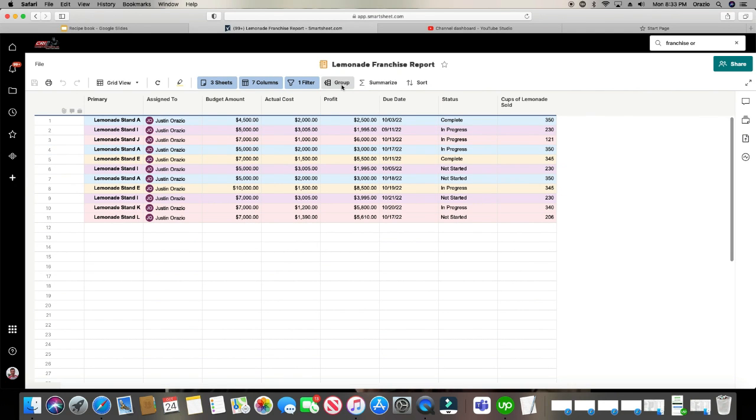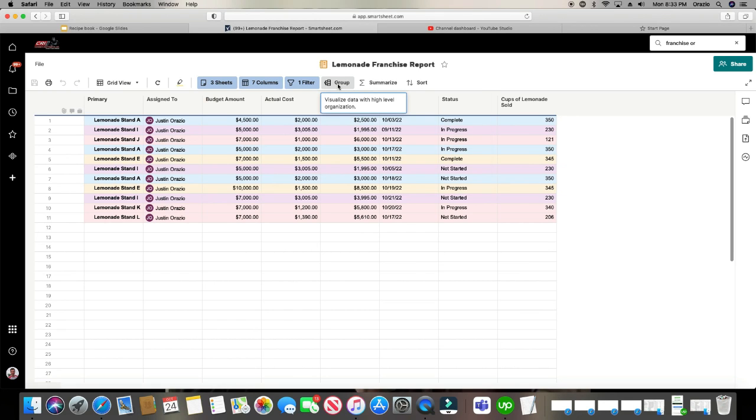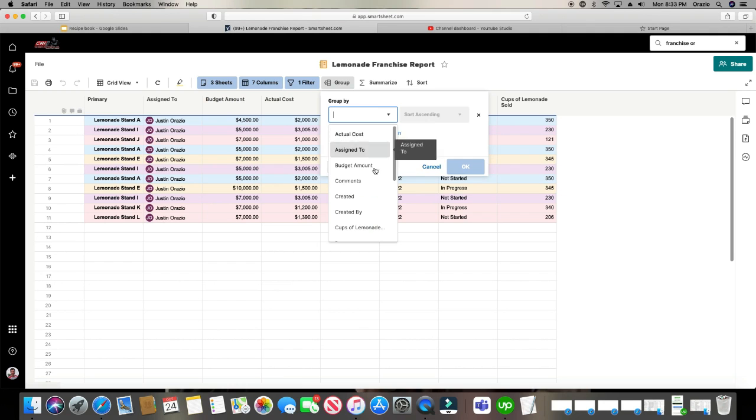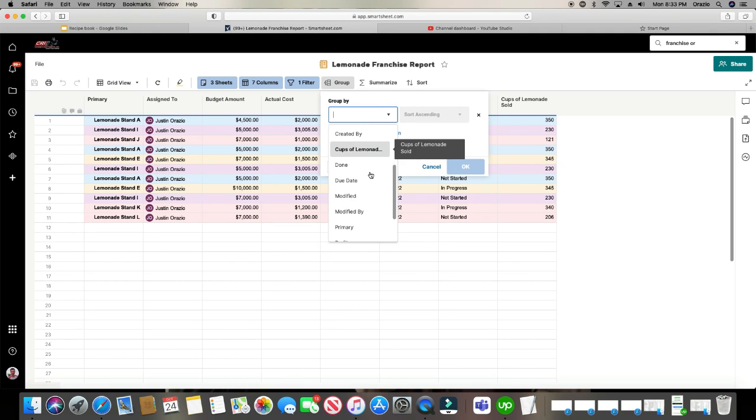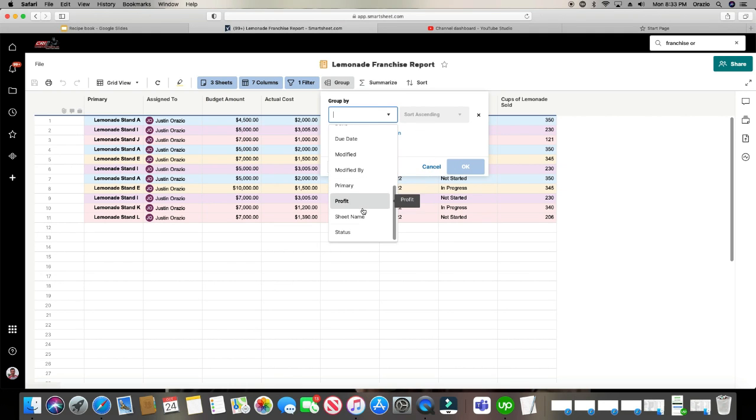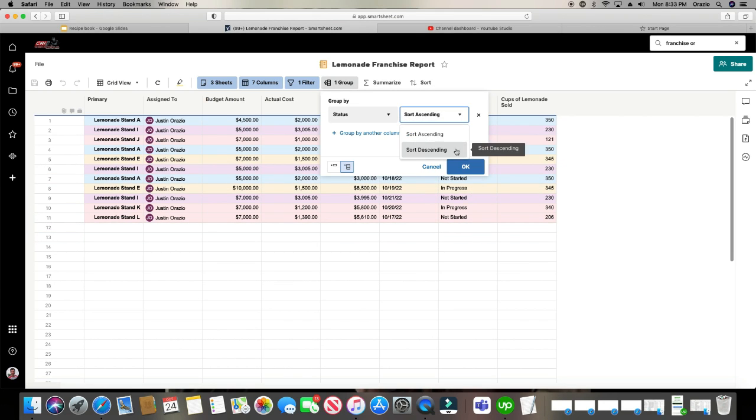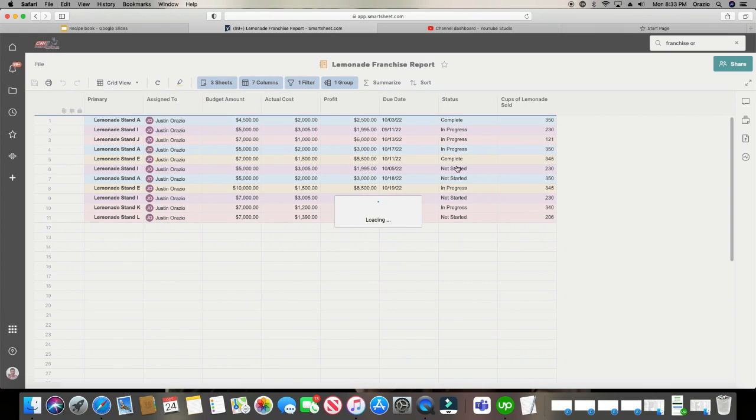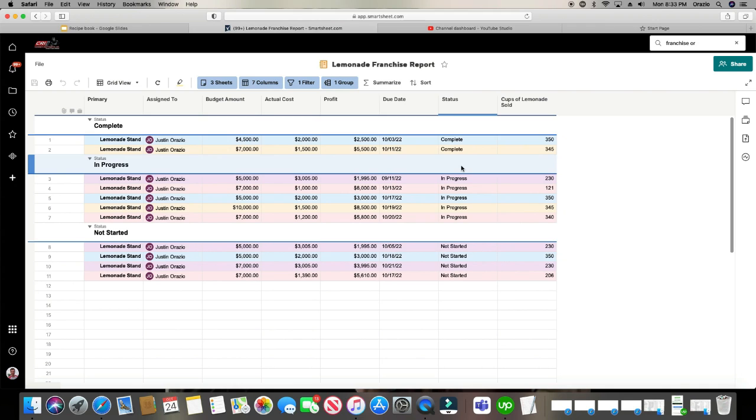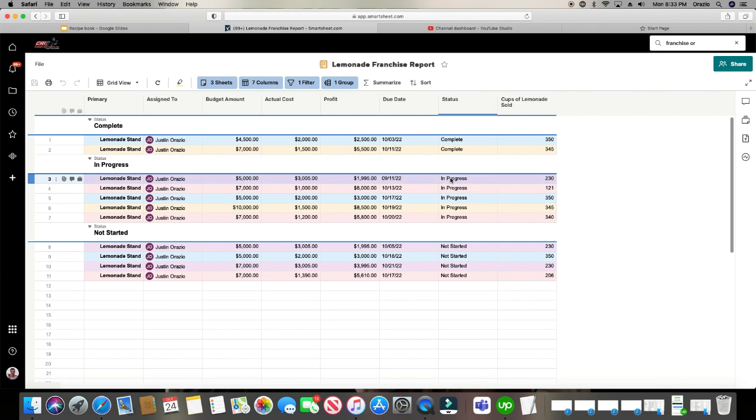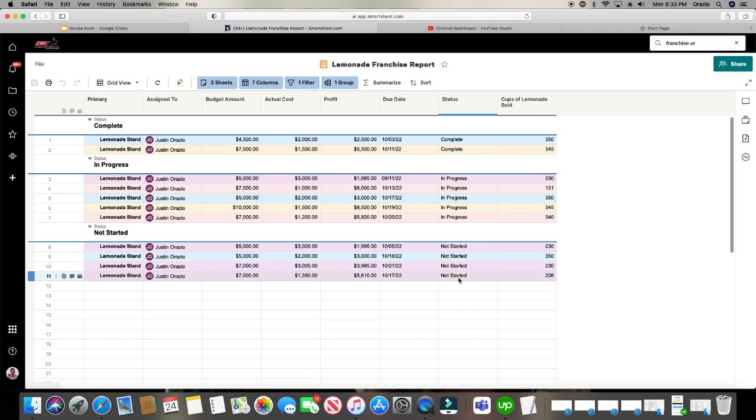And then you can group them. And so maybe I want to group it by status. So let's say we'll click status. And for status, I have completed, not started, or in progress. And you can sort ascending or descending. That's going to be alphabetical. Click OK. So it groups all the completed ones, groups all the ones in progress, and groups all the ones not yet started.